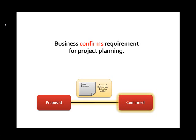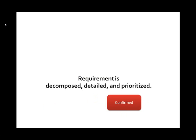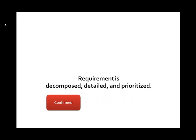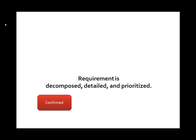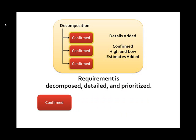After the requirement has been confirmed, Notion is responsible for decomposing and detailing the requirement. At that point, sub-requirements may be found, confirmed high and low estimates are added, and details are added, including the creation of potential requirements detailed specification documents.